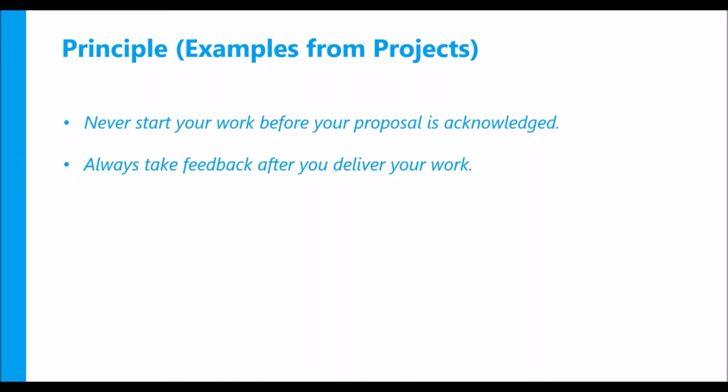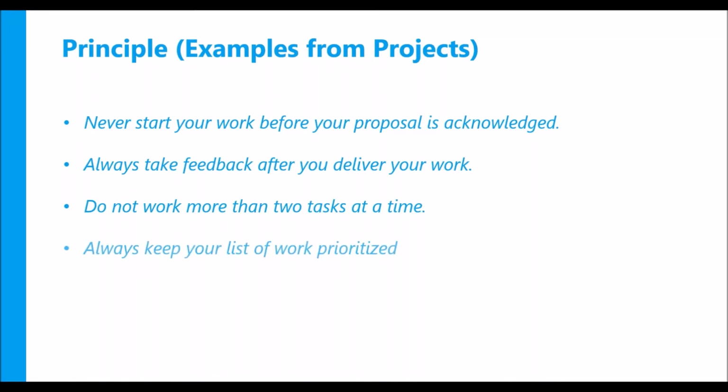Always take feedback after you deliver your work. This can be another principle. Do not work on more than 2 tasks at a time. So we have a limit to parallelization, and we can limit ourselves with a principle. Always keep your list of work prioritized and communicate objectively when you report work status. These are some examples of principles which can help you deliver your project.